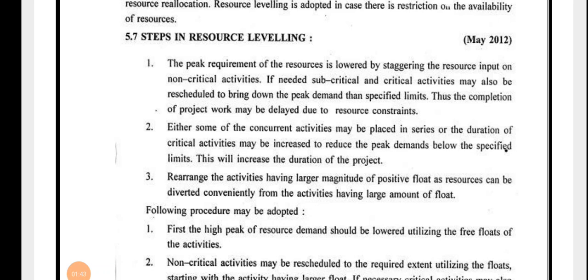Either some of the concurrent activities may be placed in series, or the duration of critical activities may be increased to reduce the peak demands below the specified limits. This will increase the duration of the project. Rearrange the activities having larger magnitude of positive float, as resources can be diverted conveniently from the activities having a large amount of float.